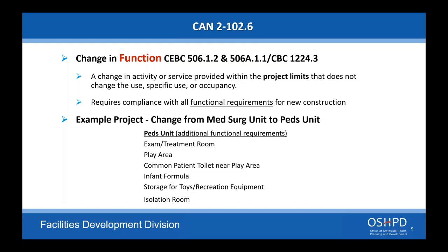If you just happen to see it when you're up there, it would be triggered as a future existing non-compliant condition. It's the owner's call if they want to replace it now or later, but it would need to be repaired because existing non-compliant would trigger a condition be placed on the facility.